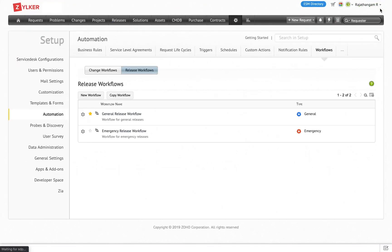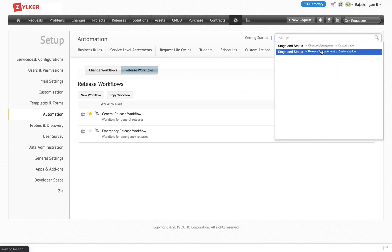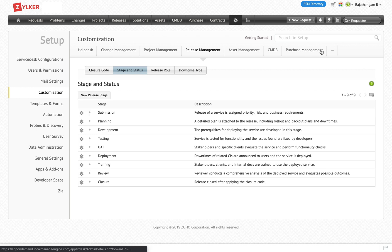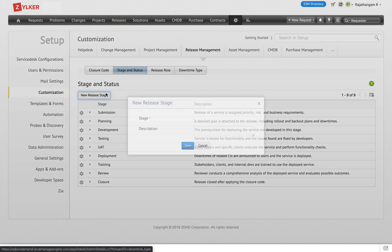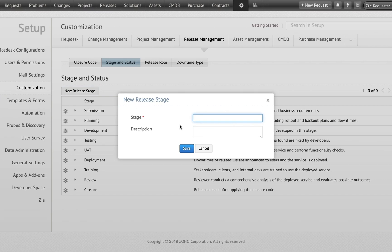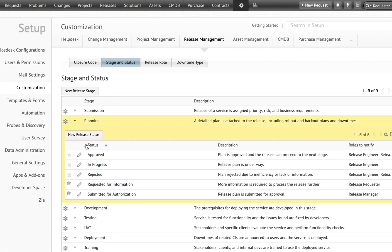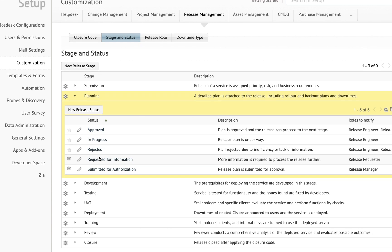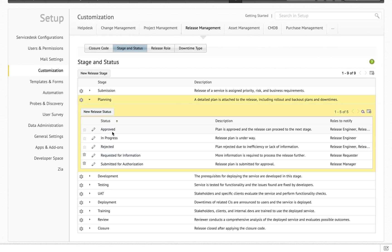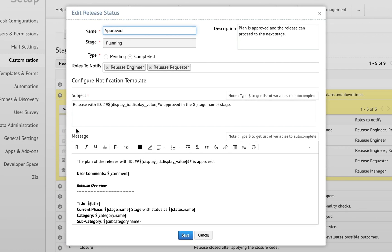Let's take a look at how stage and status are configured — we have dedicated stage and status for release management. For release management you can create as many stages as required, and for each stage you can have as many statuses and actions available. These stages and statuses are used in the change workflow, defining how the change travels from one stage to the other. Each status has its own notification template and content, and the notification for each stage and status is sent to a release role.